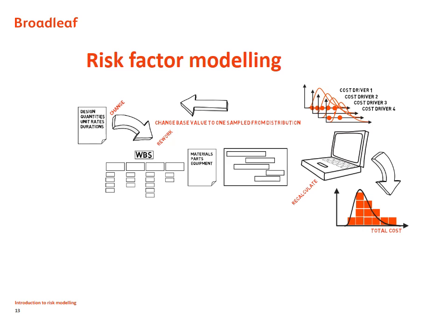And of course, there won't usually be just one uncertain cost driver in a project. There will usually be several. They might include the duration, the scale or quantity of the work, rates for labour and materials, workforce productivity, and others. If we go through this process many times, with all the uncertain inputs being sampled at the same time, we will get a simulated distribution of the combined effect of all those uncertain cost drivers on the total cost.